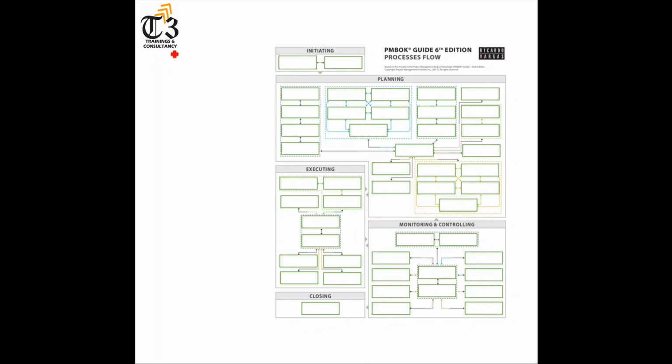So there is a department, person, or could be anything, you can name anything, called the business analyst. They always perform the needs assessment. In needs assessment, they perform the current state analysis and then the future state analysis, and then they do the gap analysis. Where is the gap between delivering the values and the real values? Based upon that, they prepare a document called the feasibility study, which contains multiple options for doing the project.